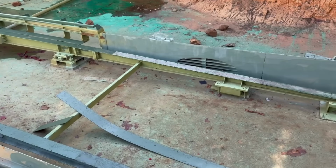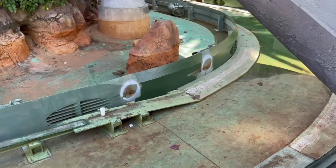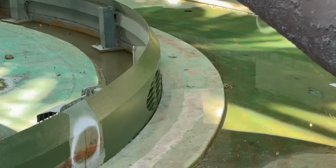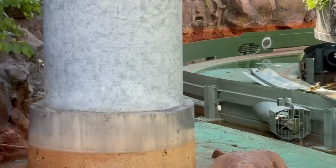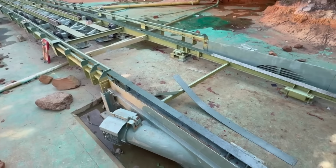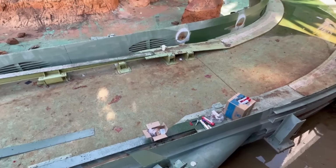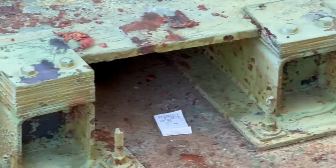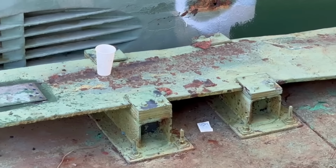And the hard one that every park seems to have trouble with, including the one where I was, is that once you start to deviate from that schedule, it requires overtime and a lot of money to pull that schedule back into line. Because if you don't want to spend the overtime and you can't get the people in to do stuff, and you can't focus on it because maybe the park wants the maintenance department doing all these other things instead of the refurbishment that they're supposed to be doing, then that schedule just starts to get deviations. It just deviates further and further and further from what it was until eventually everything is messed up.